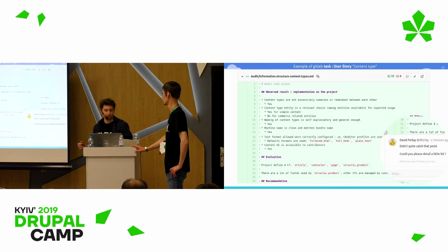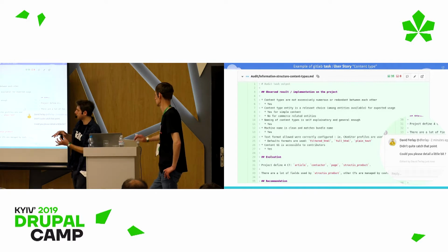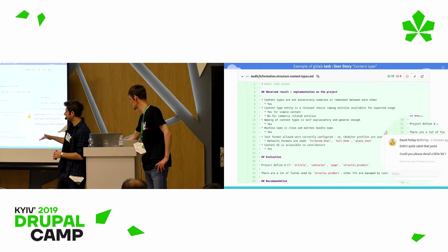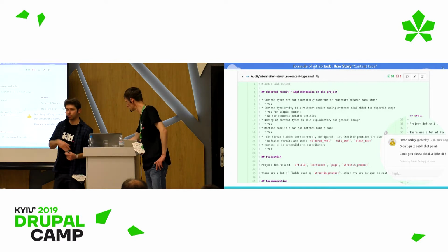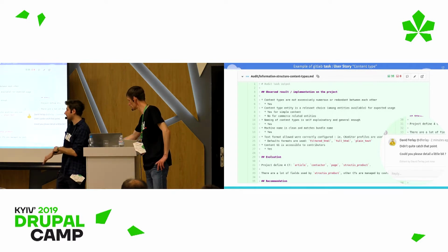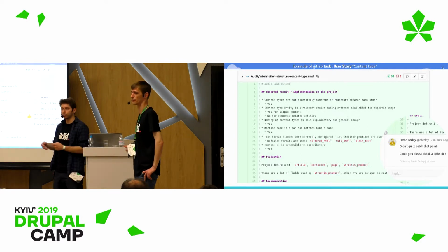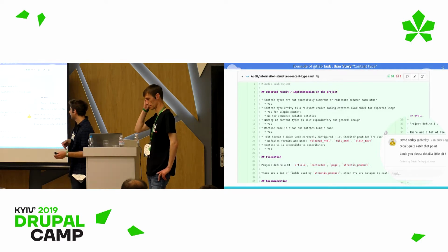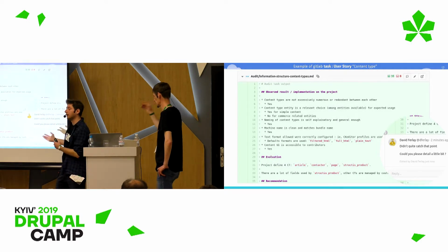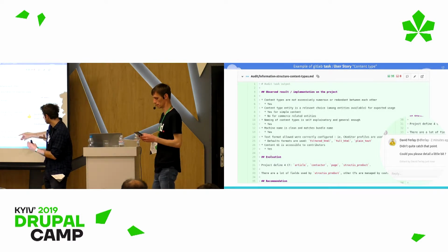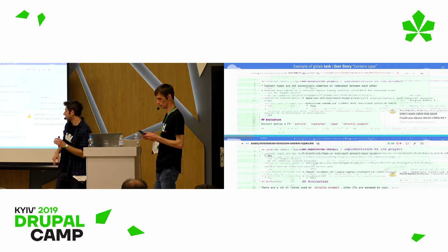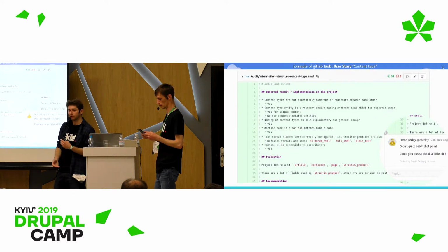You may write anything you want, and that's more for the project manager, not so much for the customer. Basically, when the developer conducts the audit for this user story, he's going to write down all of this, and then the project manager is going to look at the merge request with this markdown file with the result of the audit for this topic, and then we can start to interact with the developer who conducts the audit for this task. So you can add comments using the GitLab UI to say, hey, this I don't really understand, so please can you be a little bit more specific about what you found out and what you evaluated for this topic, and can you try to rephrase it? So we can really refine the answer of the audit for each topic.